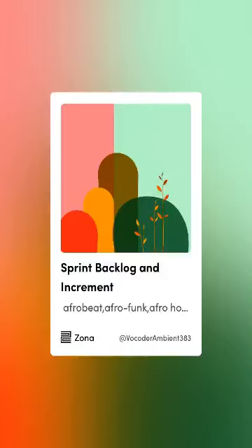The sprint backlog is composed of the sprint goal, the set of product backlog items selected for the sprint, as well as an actionable plan for delivering the increment. How? The sprint backlog is a planned buy-in for the developers. It is a highly visible, real-time picture of the work that the developers plan to accomplish during the sprint in order to achieve the sprint goal.